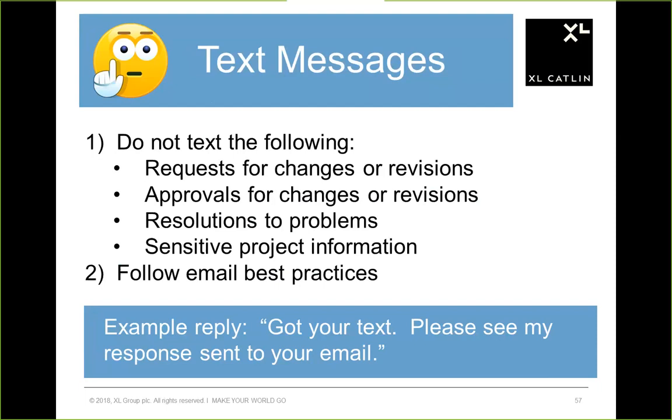And so if you do have a client that tends to use text messages, my advice is acknowledge the receipt of the text and reply to it via email, so that you do have documentation of the guidance or response that you've offered to the client.